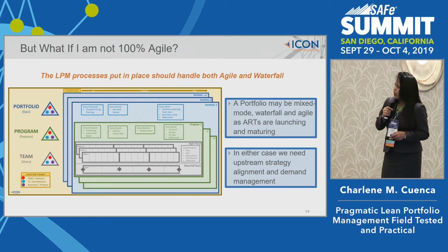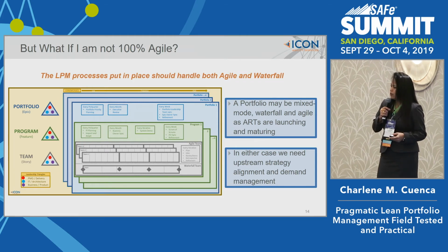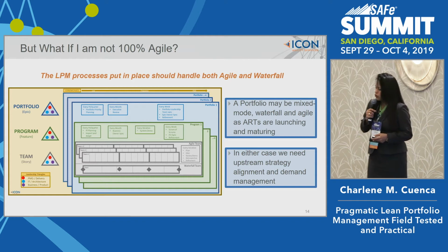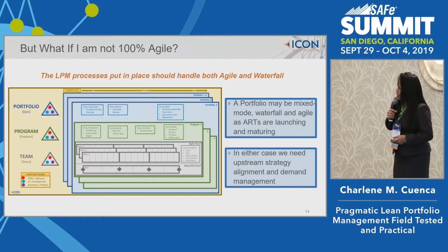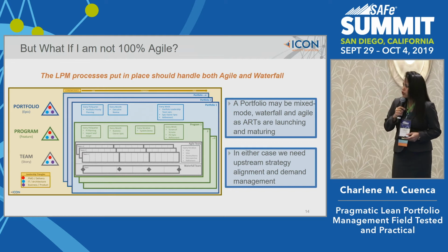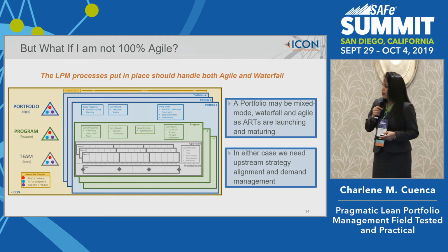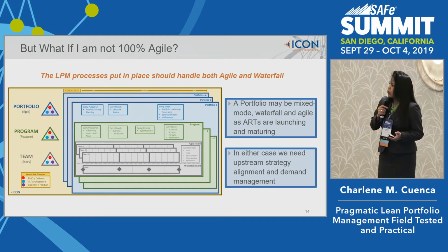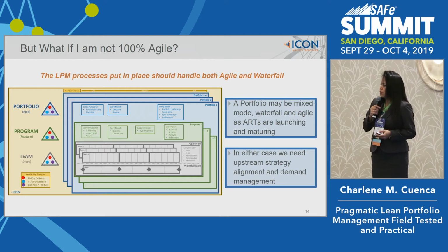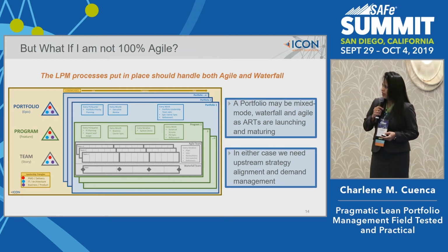So at the beginning of a PI cycle, you're going to do PI planning. At the end of a PI cycle, you're going to do an inspect and adapt workshop. And then in between there, you stay in sync by doing your scrum of scrums, product owner syncs, and also refining your backlog. And the way you show value deliveries is through system demos. So that's pretty common cadence.